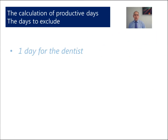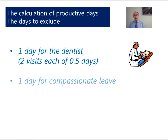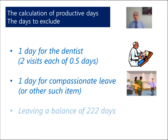Next, we also have to take into account some other items. We want our team to be healthy — they will probably go to the dentist twice a year, so that will exclude 2 half days. And it may be that we have to take into account other items, perhaps some compassionate leave, so let us allow an additional day for that. This gives us a balance of 222 days that they are available.